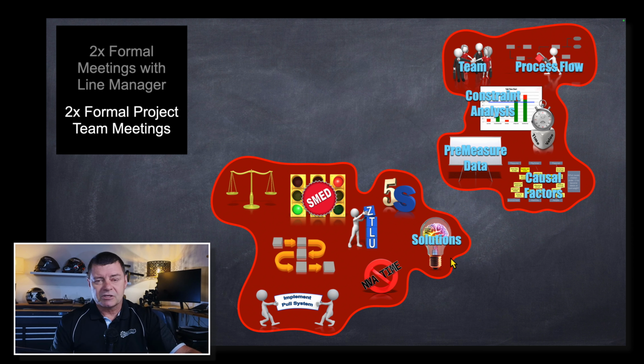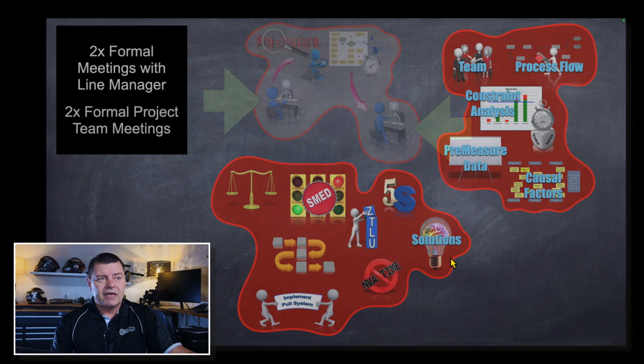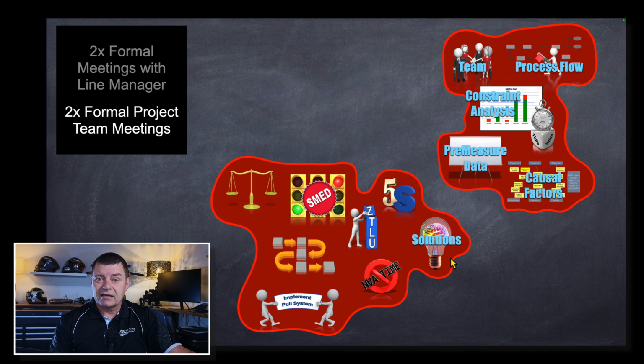That part up to this point, we can control. And in the last 15 years, that has always taken us 2 weeks of work, 1 week for the prep phase, or the pre-measuring phase and setup, and then 1 week for the analysis and solution phase. Those weeks might be back to back, or those weeks might be separated by a gap in between. It depends on the project. So you can complete projects in a much faster way.